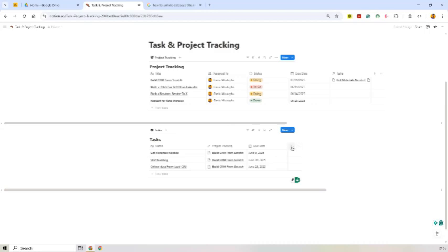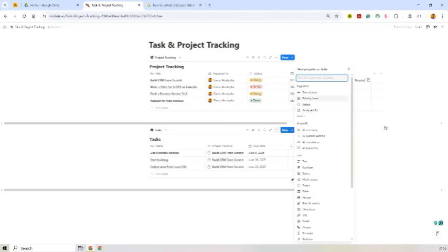There was a time when Notion had not even integrated dependency. Then you had to be arranging in descending order, ascending order, tasks done, tasks not done. But this you can even leave like this and just add dependency. Once you add dependency, you know that you cannot continue to this one except this one and this one are done. Now let me add it here. Have a look at it.